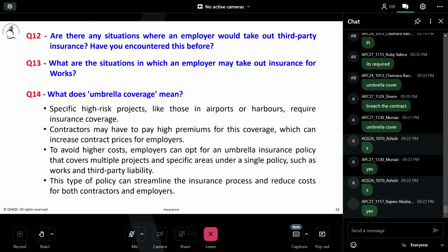In the particular conditions, they will mention subclause 18, right? They will say 18.2 is not applicable. 18.3 is not applicable. Yes or no? So if it is not applicable, that means you don't need to price it. And 18.4 also not applicable. They will cover it. Okay.